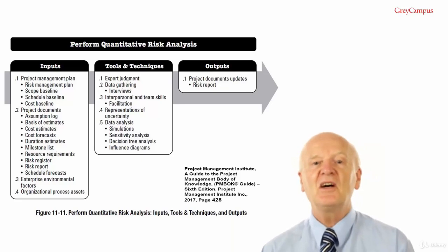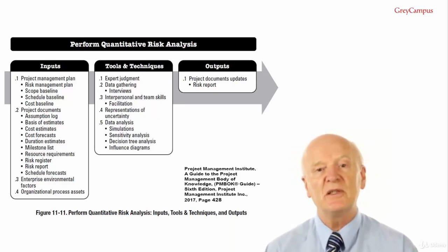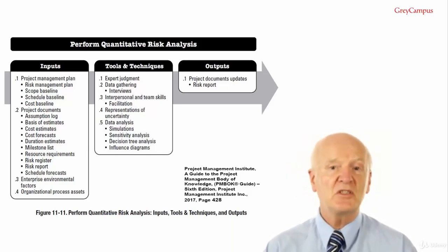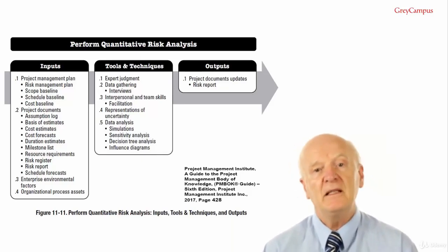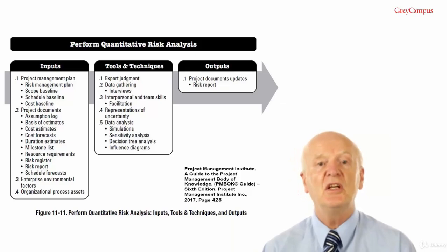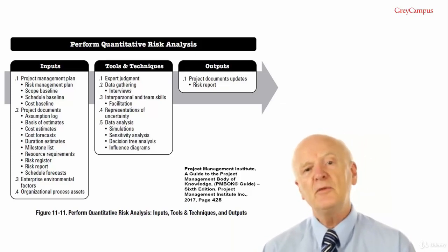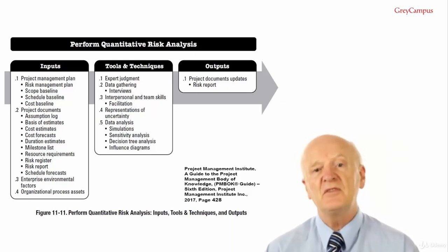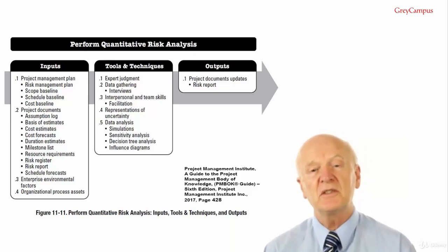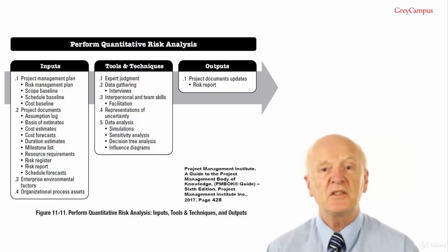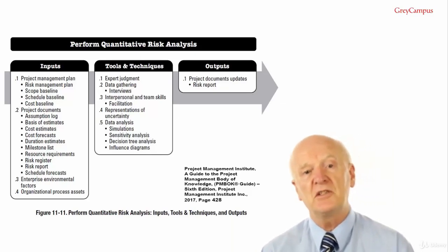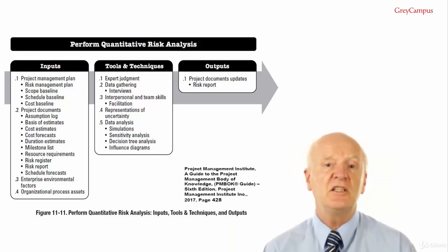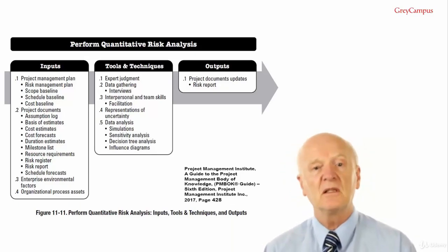Monte Carlo analysis uses the project cost estimates for cost-risk simulation, and it uses a schedule network diagram and duration estimates to simulate schedule risk. An integrated quantitative cost schedule risk analysis uses both inputs. The output of a quantitative risk analysis model, the input values, e.g. the cost estimates, duration estimates, or occurrence of probabilistic branches are chosen at random by Monte Carlo for each iteration. Outputs represent the range of possible outcomes for the project, e.g. project end date, project cost to completion.